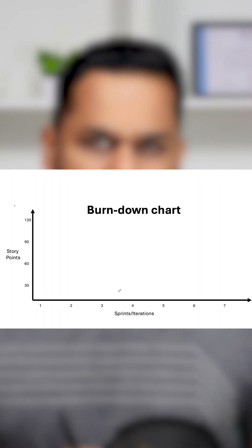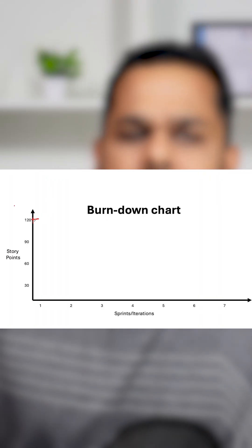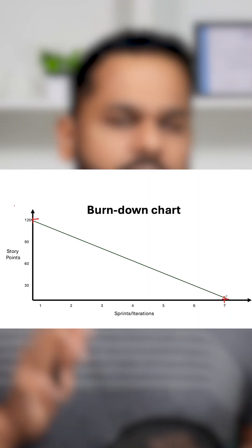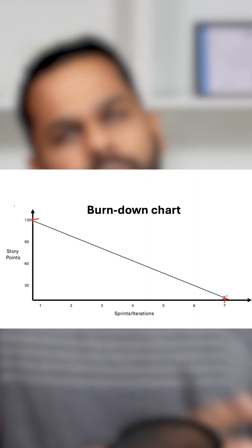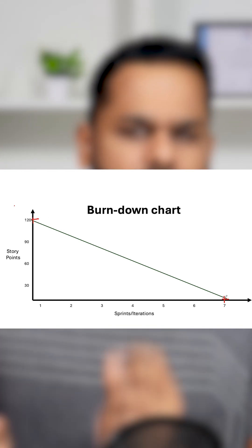When you look at this chart, there are 120 story points to complete, let us say in this particular release, and we have 7 sprints in which we have to complete that. So your plan would show this straight line — we will start with 120 and end up with 0 story points remaining at the end of the 7th sprint. That's what our plan is.